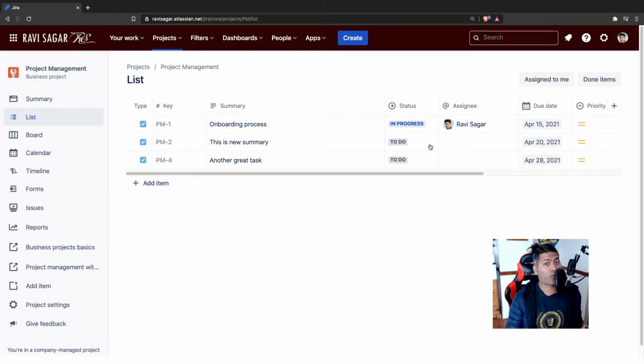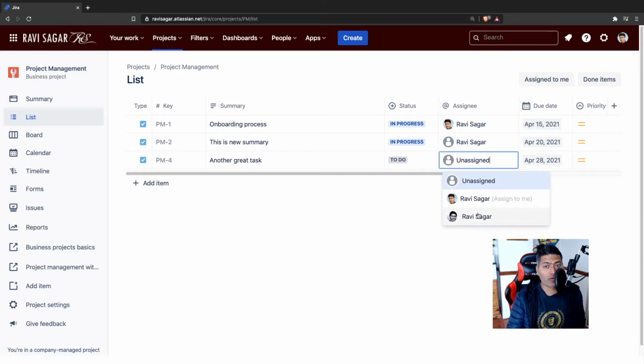And you can also transition the issue. That is awesome. For example, you may want to change the status to in progress, and you will only be able to transition to a status which is applicable. So basically, it will follow the workflow. Right now it seems like it is a simplified workflow, where you can make any transition, reach any status from any status, but it will follow the workflow. You can also assign the issue to someone, which is awesome.